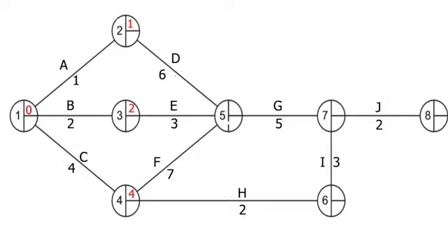So let's imagine we went from node 2 and added 6 weeks. Well, that would be 7 weeks. But that wouldn't work, as activity F would not have been completed. So we'll have to go by activity F, meaning node 4, which is 4, and then you add it to the 7 weeks, and that'll be 11 weeks. So by 11 weeks, every single activity prior to it will have been completed, and therefore it will be the most efficient point at this moment in time to make sure that we can go ahead with the project without any delays.